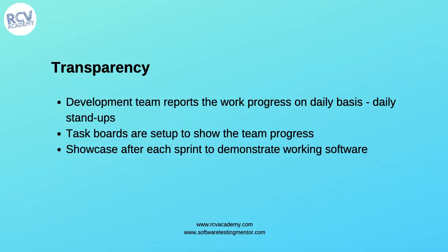Transparency is another key element. The development team reports work progress on a daily basis through the 15-minute daily stand-up meeting. Task boards are set up to show team progress, and there is a showcase after each sprint to demonstrate working software. Each team member is accountable and transparent about the progress they've made within the sprint. These are the key things around Scrum and what Scrum is.